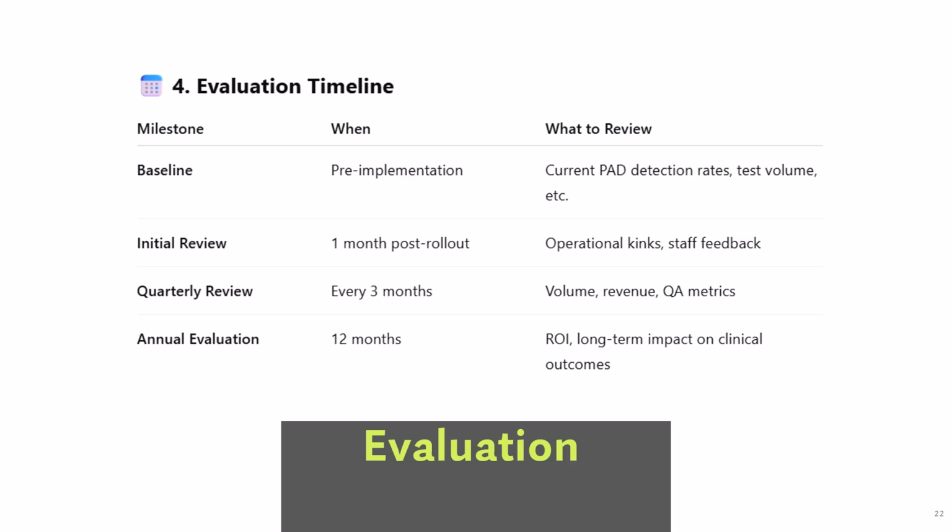Ensure that all major aspects of the program are reviewed: clinical, financial, and operational. All relevant stakeholders are involved. There's a timeline for when the evaluation happens: 30 and 90 days and annually. We will need to use measurable metrics. The evaluation should be data-driven, not just based on impressions. This means defining key performance indicators at the outset. You can see here the evaluation timeline that I have set forth for this project.